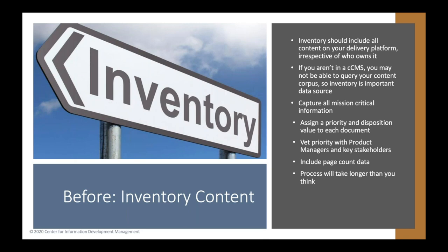So you'll use this inventory as a management and tracking tool for the conversion process. It may be useful for you as you decide who will convert the content. But it will give you data to determine the scope of your conversion, and also if you have page count data, if you need to get a quote from a conversion vendor, you'll already have the information that you need to get that.